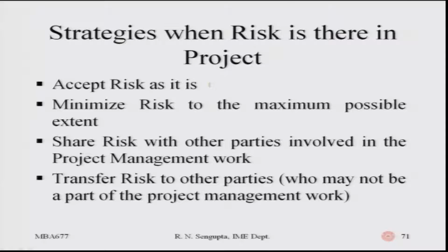Share the risk with other parties involved. So, if there is a risk from your side, try to pass it on to the vendor. Obviously, there would be contracts for that, such that if a risk is being borne by the vendor, the vendor should also get some benefit. So, you try to share the risk in such a way that the overall job descriptions and job distribution